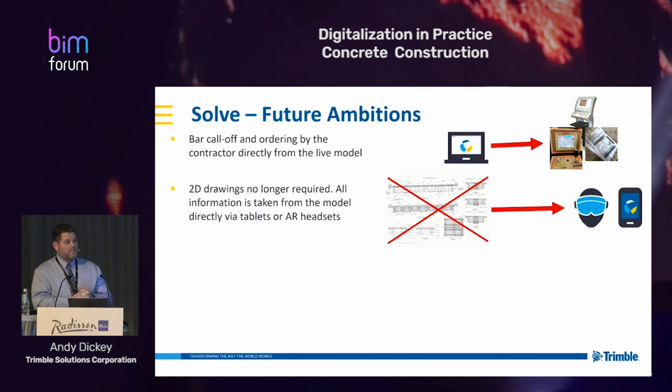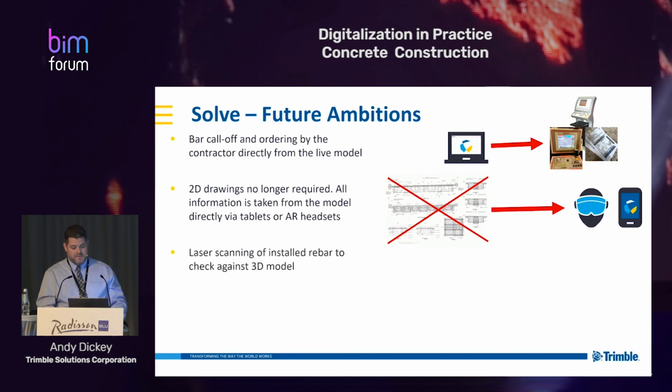We had one project, I won't name the project, but they told us that it's in the UK, and it's requiring 2,000 pounds or some 2,200 euros per drawing to create the rebar shop drawings. And there are some tens of thousands, maybe 20,000, some crazy number of rebar shop drawings on the job. Their guess was we spend anywhere between 20 and 40 million euros on the project just for the rebar shop drawings. So maybe you can guess what kind of project that is. But the point is, you could save that money if you didn't need the drawings, if you could use some technology like Yuka and Kim are discussing.